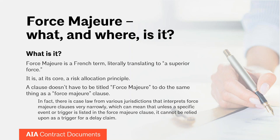Force majeure is a French term that literally translates to 'a superior force' or 'a greater force.' At its core, it's a risk allocation principle. The idea behind a force majeure clause is to embody the concept that construction contracts anticipate and have mechanisms in place to apportion risk, and as a result, adjust project schedules, contract time, contract sum, etc., if a party is unable to complete their contractual duties due to a superior force. Importantly, a clause does not have to be titled 'force majeure' or even use those words to function as one.